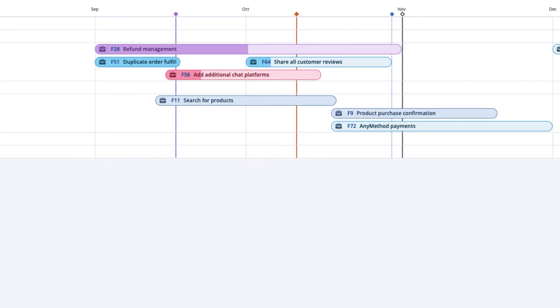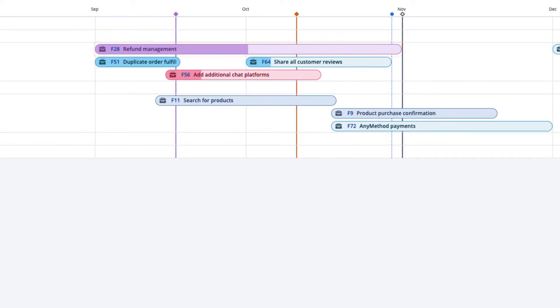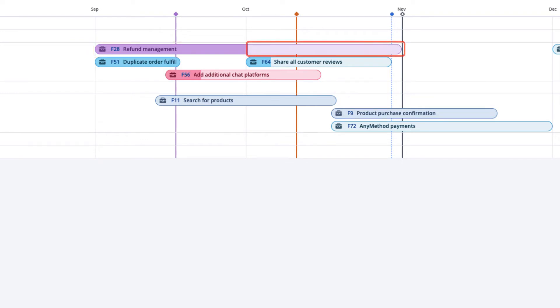There are several ways to view the progress of work for a Portfolio Item on the Timeline. The color shading on the Portfolio Item shows the progress of the acceptance of stories for the Portfolio Item. The darker shade shows a graphic depiction of the percentage of story points that have been accepted in time. The lighter shade shows the remaining story points to be accepted.